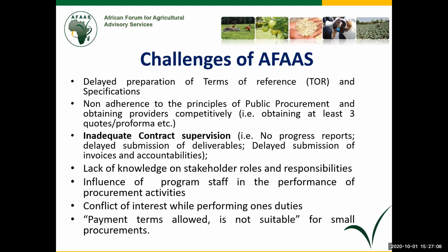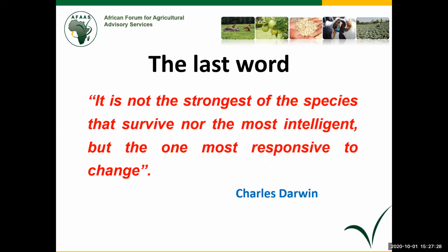What do we mean here? The procurement is of 500,000 or 2 million or 3 million, but the payment terms we are saying 30 days net. There is no economic value to a provider, he might jump out. And my last word,